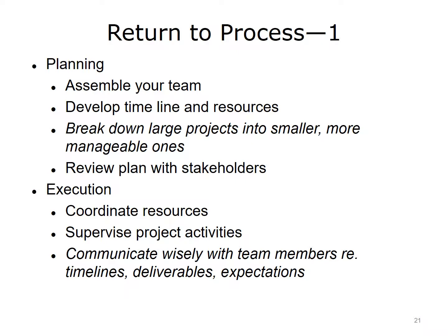So you might take a complex project, such as digitizing a medical office's paperwork, and break it down into manageable parts. These might include one project for converting records to digital format, another for training personnel to use the digital database, and then a final project to post the database online. This process allows you to step up to meeting the overall objectives of the project by reaching achievable goals and charting your progress.